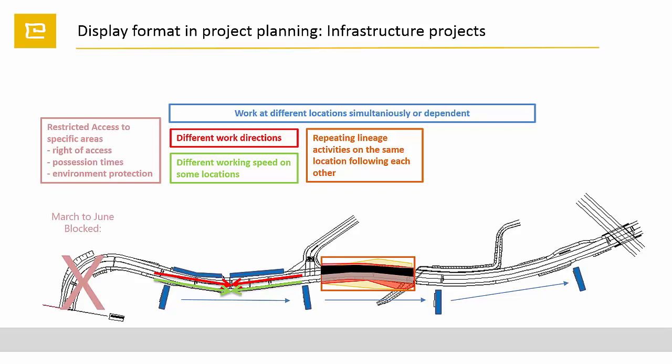There is also restricted access to the site coming from right of access, right of way, procession times, or environmental protection instructions.